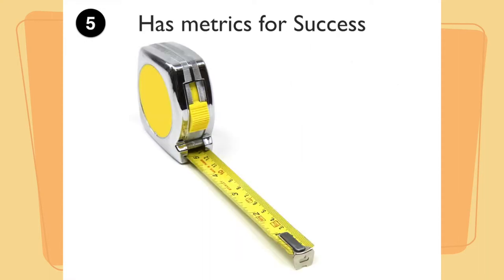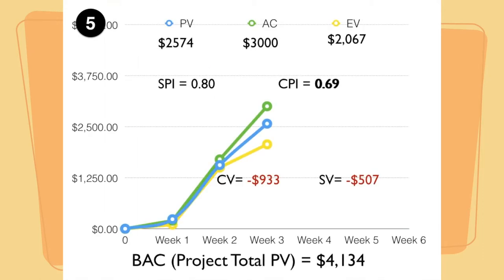Fifthly, there is some measure for success. So we have some way to judge our progress as the project moves forward. In a traditional project, we might use something like earned value metrics to come up with some measure of our project and a projection for where we are going to end up. In agile projects, we might use something like a burndown chart to give us an understanding of where we are in the project, as well as the amount of time to complete the work that we currently have scheduled.